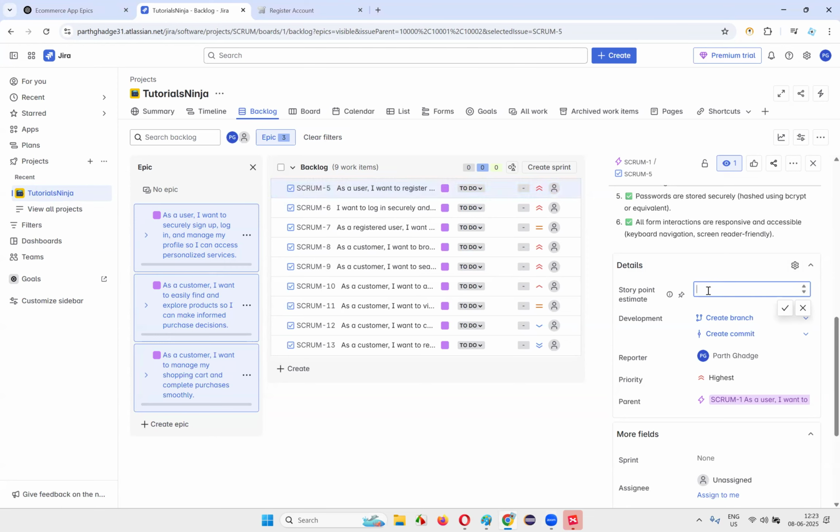Take a story like I want to register using my email and password. Here, how do we measure the complexity and size of the requirement at a high level? It's not in a particular unit, it's just points when compared to other stories, where this will stand. Like first rank, second rank, third rank. How do you give that? You are comparing one person with another person, then you are giving the ranks, right? Here also the estimates will be given roughly by comparing different user stories.